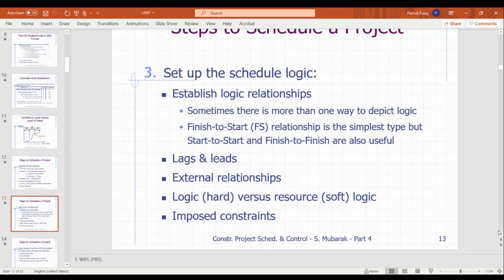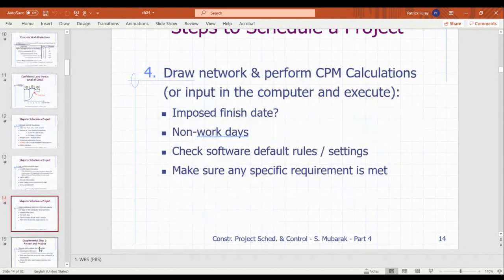Imposed constraints, those could be external, they could be internal. This place needs to be operating in 35 days. This place needs to operate during construction, so construction can only occur from 2 a.m. to 6 a.m., something like that. Those are not physical constraints that come from the construction project or materials. It's not cure time for concrete, or manufacturing time of ductwork. These are constraints that an owner, or a user, whoever it is, can add that might drive a good portion of the schedule.